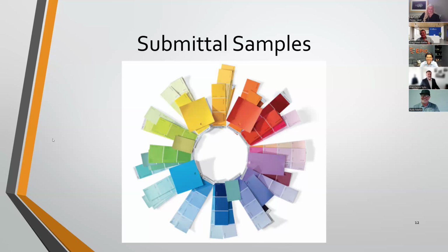Too many weeks. Months, weeks and months. Yeah, if you're going to make any material changes, color, or if you're taking planters out of a deck, most folks are looking to bring more relevance to the asset, because it might be older. Those material changes need to be identified in the early stages of the process, typically right around the point that the design team is released to actually go forward with design.